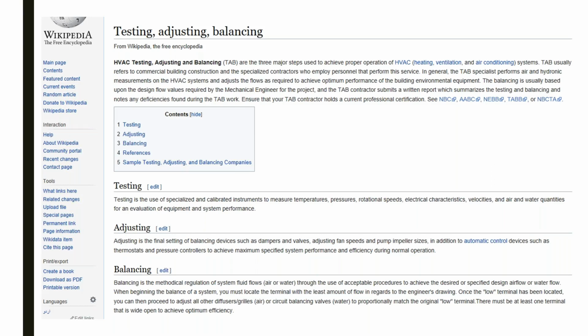Eventually I told him that, okay, if we get to 6 systems and we're not good, you need to do it all over. And that's what happened. We could not find one out of the 6 that matched their report and the design. So he had to redo the entire building again. And then I have to come back and re-verify. Does that mean they made it up, you think? Is that what you're thinking?